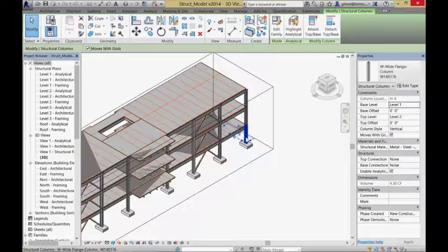We can add fields to it. So for example, one way to think about getting our schedule and our model in sync with each other is to start adding what I'll call a task ID to each of the different elements in the model. Okay. If you associate every element in the model with a specific construction task ID, then all of a sudden it becomes really easy to think about what's going to be built when, because you're just explicitly saying this will be part of this construction activity. Okay, so how you can do that whenever you want to customize the model looks something like this.